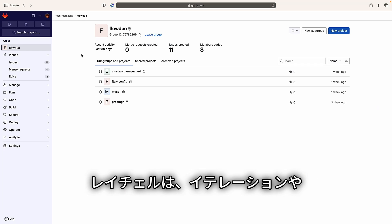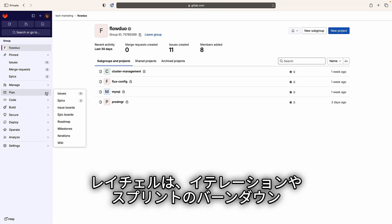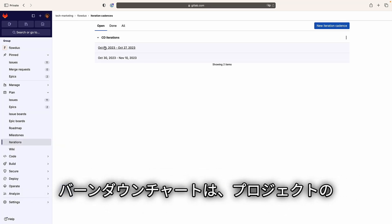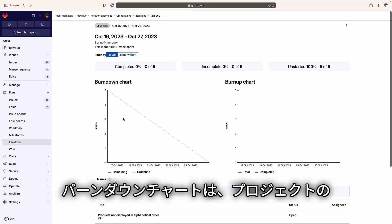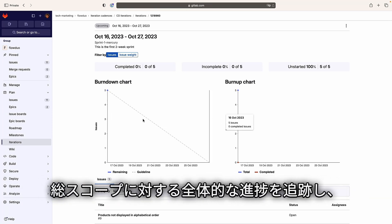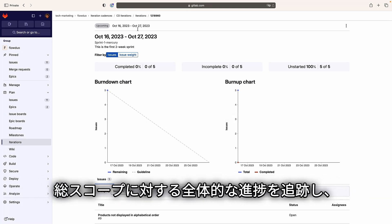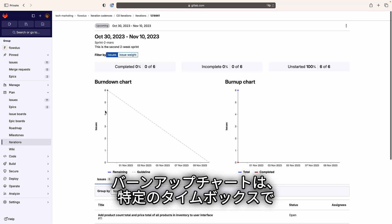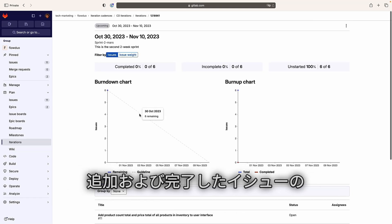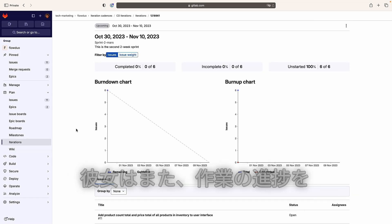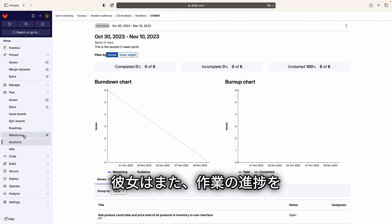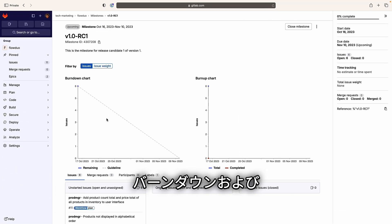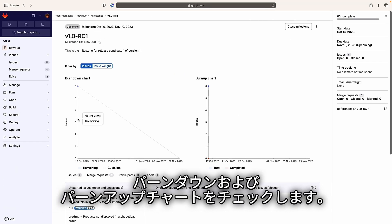Rachel checks the iteration or sprint burndown and burnup graphs. Burndown charts help track overall progress towards a project's total scope, while burnup charts track the daily total count and weights of issues added to and completed in a given time box. She also checks the burnup and burndown charts for the milestone to visualize the progress of the work.